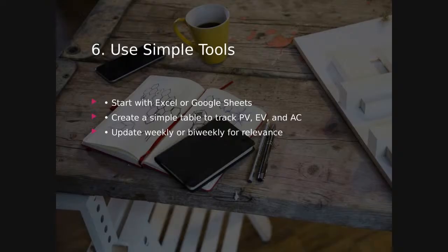So you would set up your Google Sheet with the AC information, the PV information. Already you've broken down your scope, right, into the WBS. So you got your EV, your PV, your AC, you're being honest. You've got access to those numbers coming in for resource hours or cost. If you do a conversion, a lot of firms get stuck on, well, Phil is $100 an hour and Bob is $200 an hour. How do we get all their monies in there?